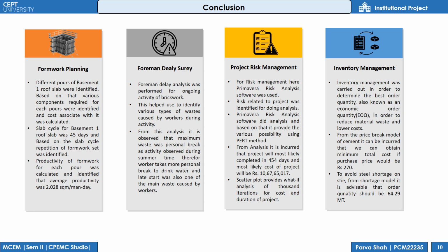Foreman delay survey. So foreman delay survey helps to identify various types of waste that occur during the activity. From this, we can analyze the financial loss of contractor due to non-working time of the laborers.